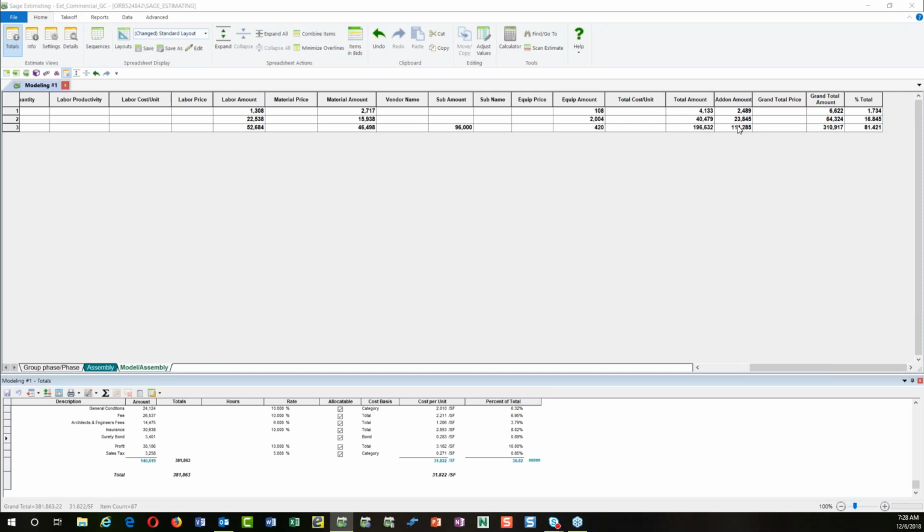What I can see in add-ons here, these add-ons, the total add-ons that we have down here, are buried in this. And when I add those proportionate to the items, my price then goes up. So this is before add-ons are allocated, and this is after add-ons are allocated.